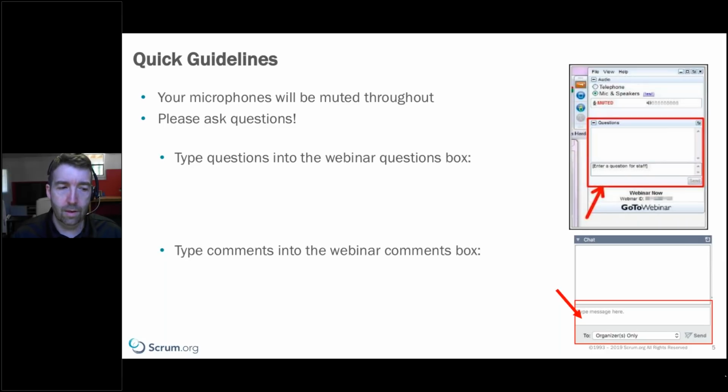So I think it's probably not a quick fix. I will presume that the development team members have good, valid reasons why they're concerned about shorter sprint lengths. And so, in Scrum, a good thing to consider is how long can we have the sprint and get the value to a done state and deliverable, but also have it be short enough to be responsive to the business needs. Now, that's a big framing of the question.